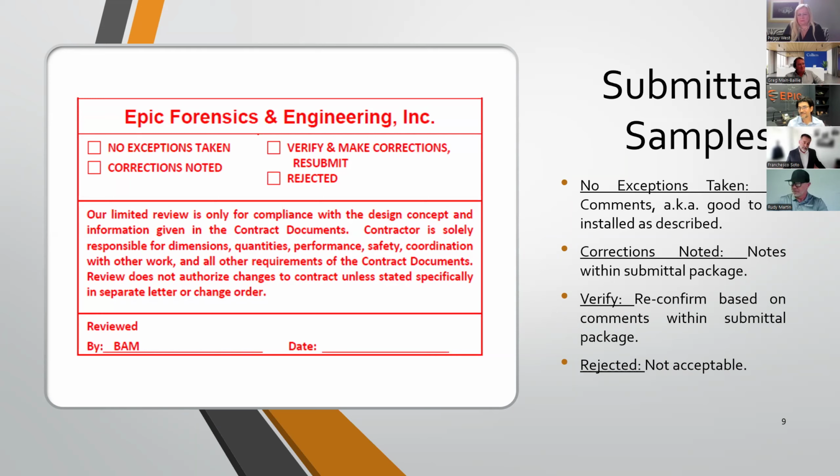That stamp there protects the engineer. If they mark the wrong one, everybody has liability. And even keeping in that same vein, if this is going to be on the back end, and if you have to go through litigation, I will be diving through the details of this as well, right? Seeing whose stamps are on there, who had the opportunity to raise their hand and say, hey, I don't think this was the right material, if that was the case. So this is a documentation reflecting of who actually received it, what professional received it.